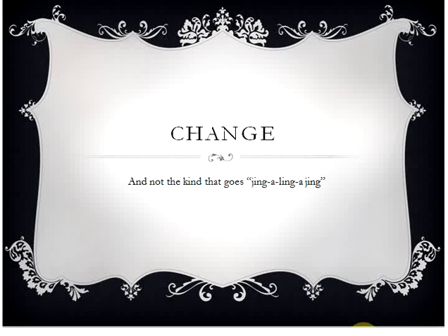Somebody doesn't think anything about it. It went from vital sign report to vital sign assessment. Sounded pretty benign, let's just change the title. Unfortunately, what changes the title is a data field, a discrete data field, that is being used by a reporting mechanism that compiles the entire medical record and exports it to the medical records department. By changing that name, this application that's doing the compiling no longer finds the vital signs.